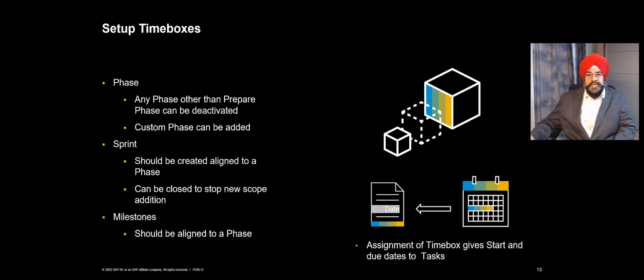How time boxes are used is very simple. When you assign a task to a time box, the dates from the time box are given to the task. Which means if I assign a task to a phase, then the start date and end date of the task are automatically taken from the phase definition.